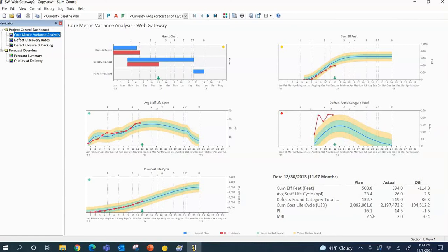right? If they didn't know this particular measure, we can see what their productivity promised was, and we can see what the productivity that's actually happening, actually occurring. This particular scenario, they're not working to the level that they had promised. So that's a problem. That's why we're late.